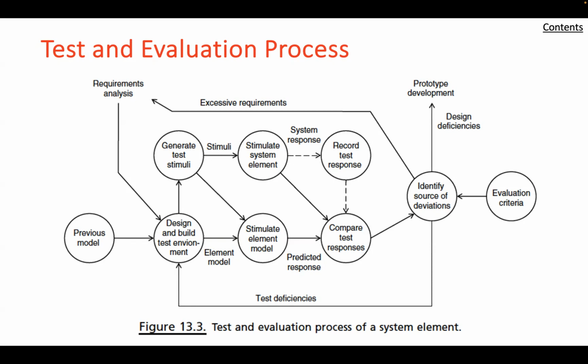For the test analysis planning, the planning of how the test results are to be analyzed is just as important as how the test will be conducted. So here are some things to be thinking about for what should be done. One, determine what data must be collected. Two, consider the methods by which these data can be obtained. Three, define how all data will be processed, analyzed, and presented. And so those are some things that you want to make sure are addressed.